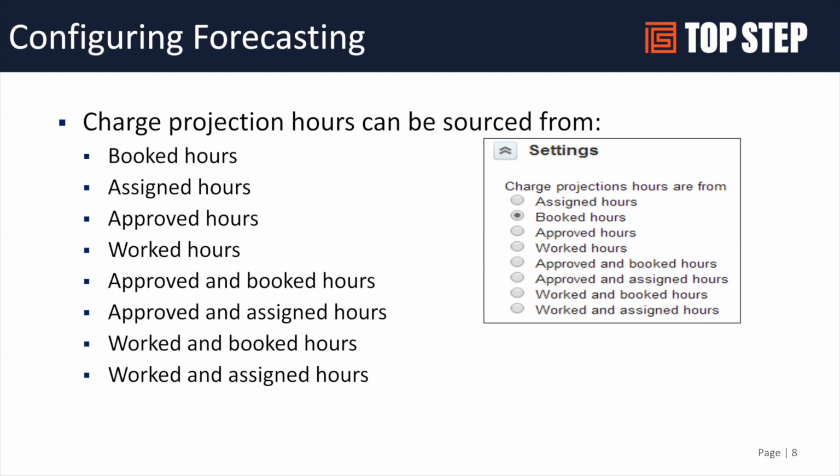This is basically going to take the booked hours, look at the rates and the billing rules by either job code or by user or other values, and generate forecasted dollars and forecasted hours calculations that you can then report on. So booked hours is purely looking at the schedule.